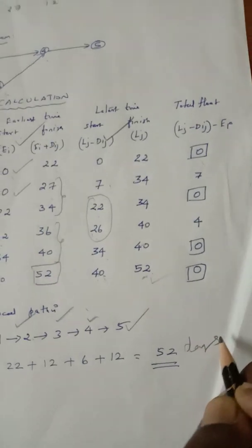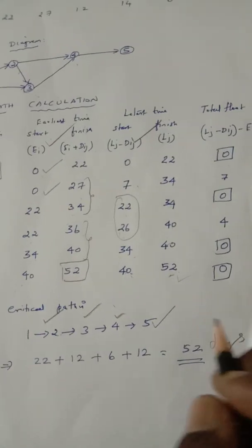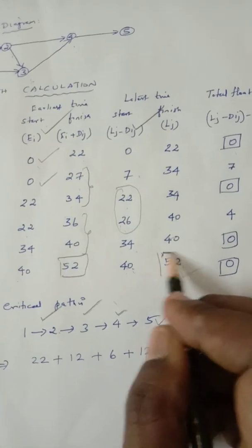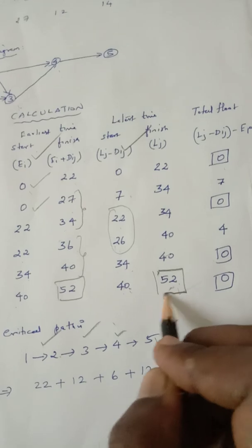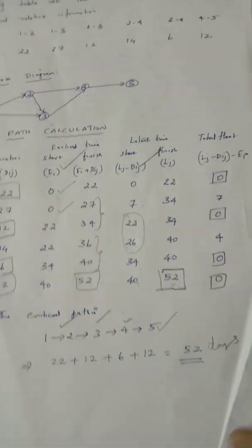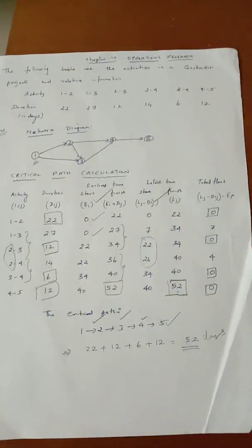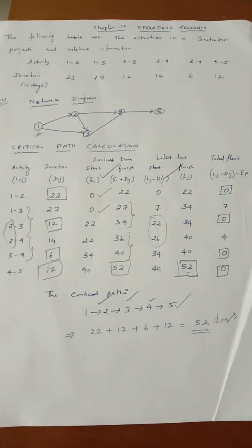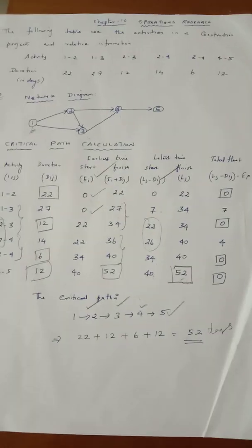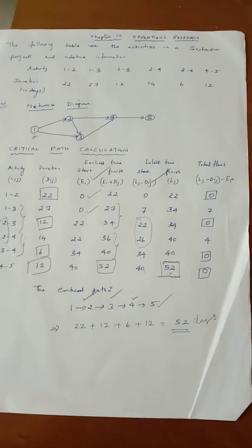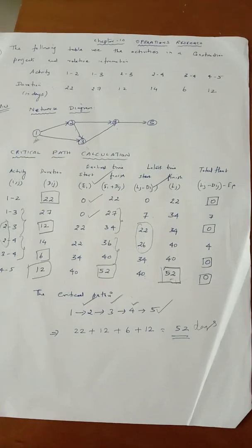The answer is confirmed. The critical path calculation gives a total project duration of 52 days along path 1→2→3→4→5.